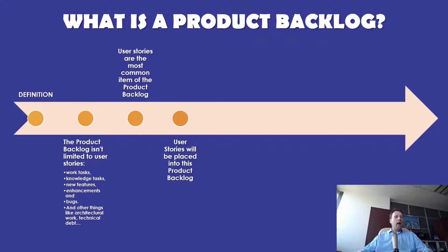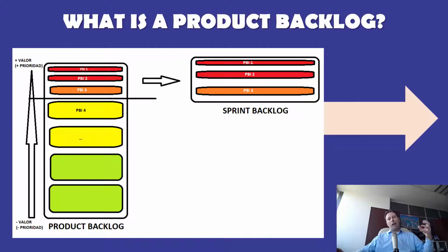Now, once you have your list, the next thing for you to do is to ask your client to give a priority to each story. And then the client sorts the previously unsorted list of user stories from highest to lowest priority. The goal is to have the most high-value features listed at the top of the backlog and the least important ones at the bottom.